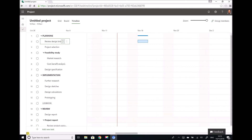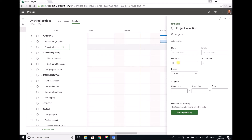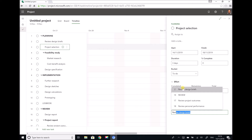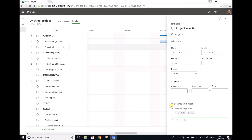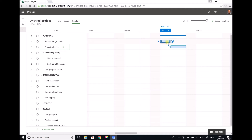Moving back along, we can see that task has been added to our Gantt chart. Next we have project selection, which we wanted to start immediately after reviewing the design briefs and last three days. So we set the duration for three days, but instead of setting a start and end date, we're going to add a dependency. The dependency here is review design briefs — we type it and it comes up as an option. We can see those two tasks now run one after the other, linked as dependencies. In Project 2016, review design brief was called a predecessor of project selection, but the outcome is the same.